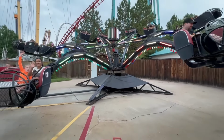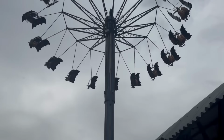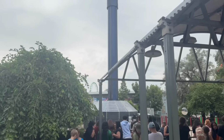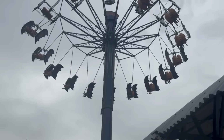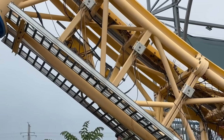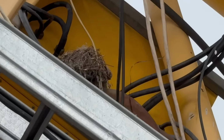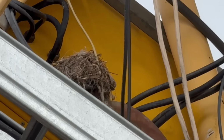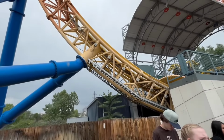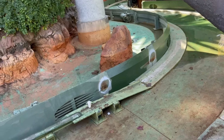If there's a bigger project on that ride that needs to happen, like it uses one large DC motor to rotate the whole gondola, and that motor needs to come off and be rebuilt, then that ride is also planned in the schedule. And they say, well, we have strong rides in that area, everything is really strong during this time of year. So during that time of year, we might drop that ride and take it offline so we can do that repair.